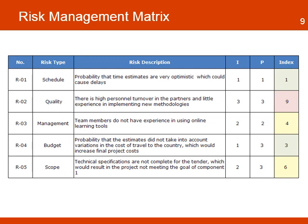For example, a high-level impact and high-level probability will give a risk index of 9. A low impact and a low probability will give a risk index of 1. With the risk index, the team can then identify those high-index risks that need immediate action and plan specific responses and strategies to avoid the risk or reduce its impact in the project.